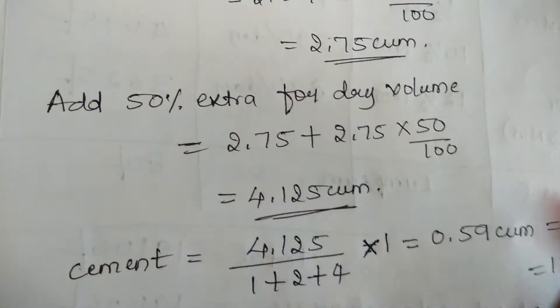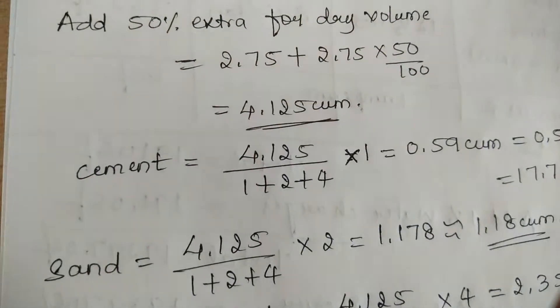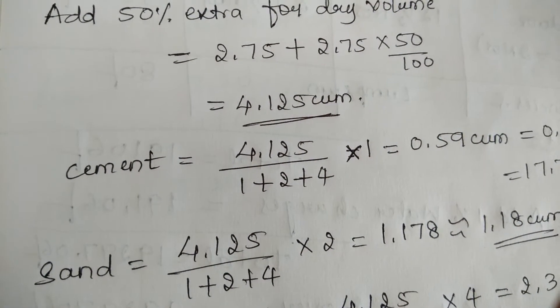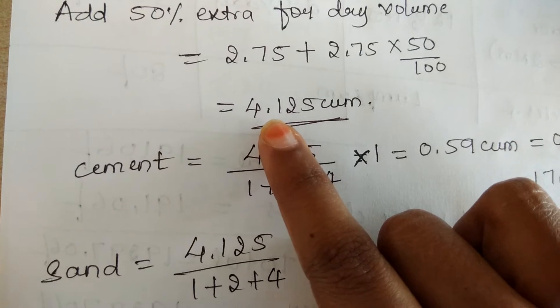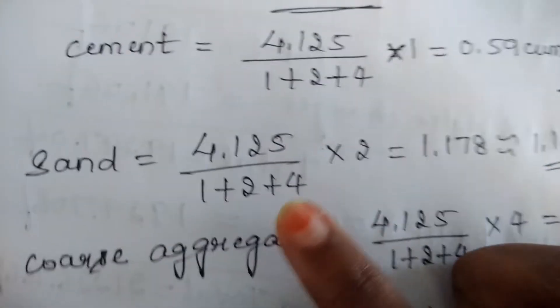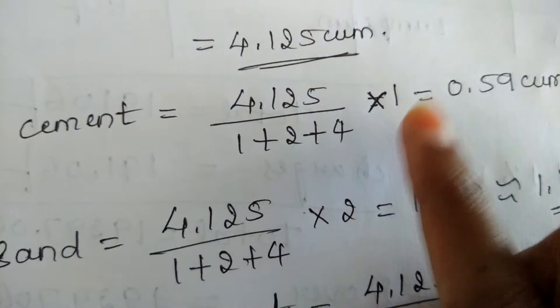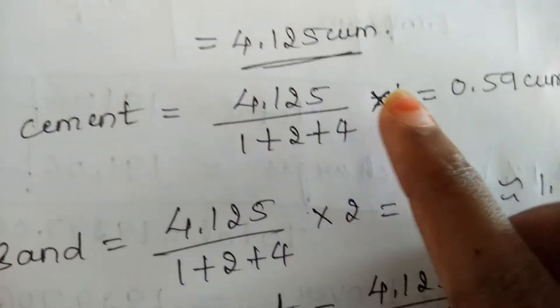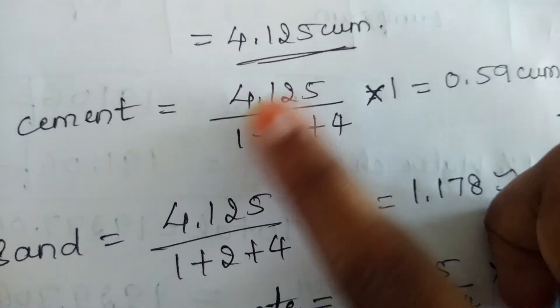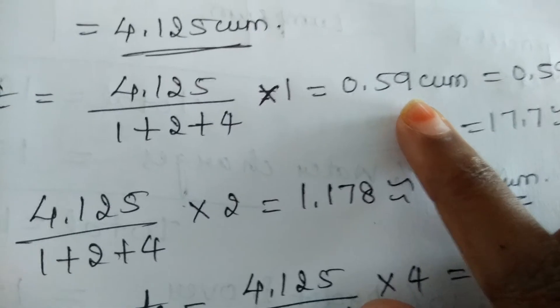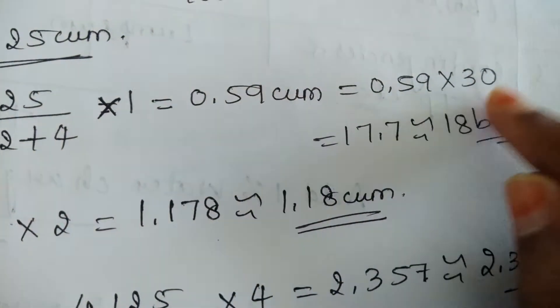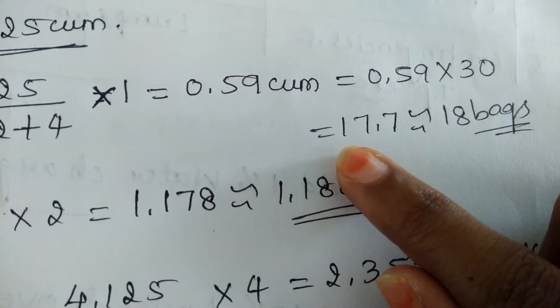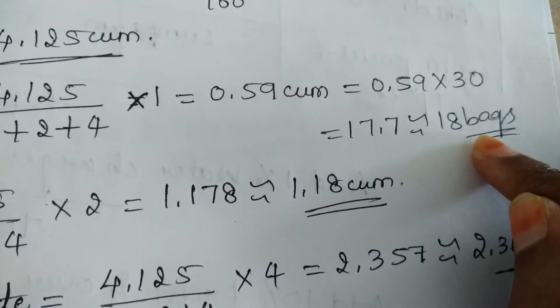Now for the dry concrete volume we have to find the materials quantity. Concrete consists of three materials: cement, sand, and coarse aggregate. Starting with cement, we take the dry volume 4.125 divided by the sum of the proportion 1+2+4, into the part of cement which is 1. On simplifying we will get a value of 0.59 m³. We always take cement in terms of number of bags, so multiply by 30 to get 17.7 — approximately 18 bags of cement.